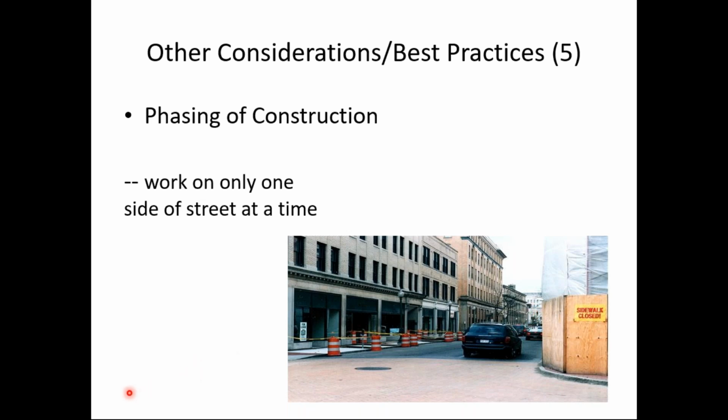So, a little coordination and communication between the public sector and private sector in this case maybe would have gone a long way. I don't know which came first, but say the sidewalk closure on the right did, maybe the street department could have delayed this project or accelerated it to get it done before the sidewalk was closed on the other side of the street.